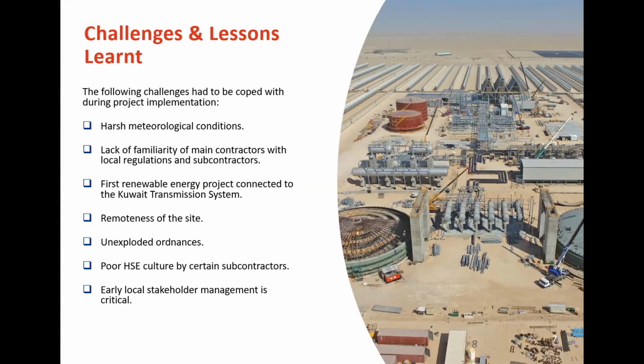And this plan included having a base camp, conducting speed controls on-site and off-site, putting in place a vehicle inspection program, providing training on safe driving to contractors and subcontractors, and putting in place a disciplinary program to make sure that anyone not complying with the regulations could be dismissed if required.